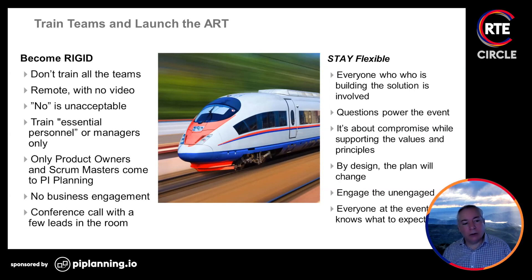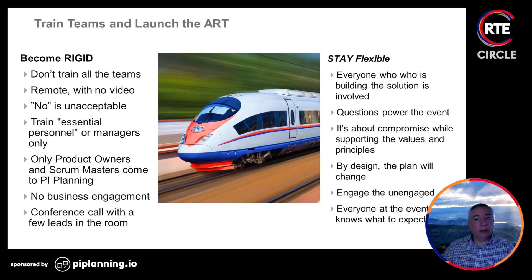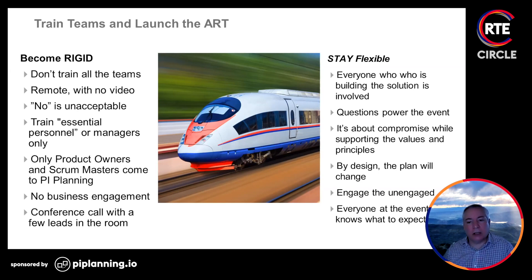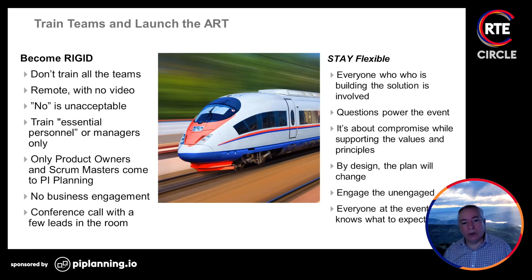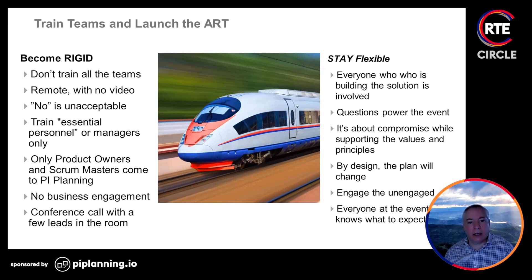Training essential personnel — managers only — is an anti-pattern. Everyone needs to be trained; if it's just managers, you won't really engage the whole team. Product owners and scrum masters aren't the only ones who should be at PI planning — the whole agile team should be there. Business engagement with lean-agile leadership is important for the continued success of the ART. A conference call with just a few people in the room isn't going to get you where you want to be.